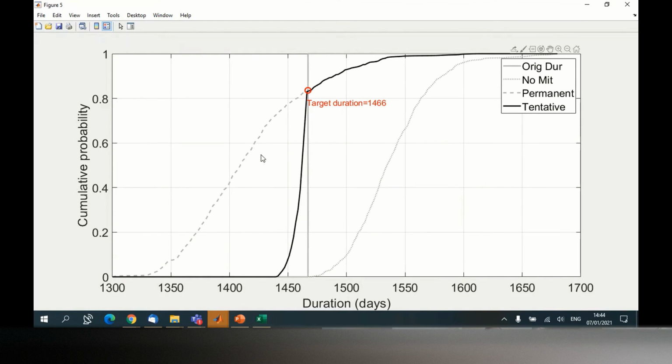See the difference? Yeah, sorry to interrupt, Omar. Now, if that is the case, does this curve also represent that the risk that we have mentioned also occurs or not? Yeah, in all curves, they take risk into account. So risk occurs with a certain probability. So in every one of these curves, the risks are included. Of course, not all of them. It depends on the probability of occurrence.